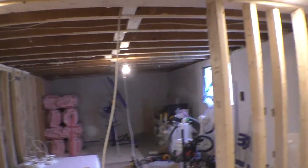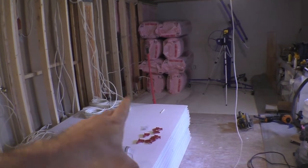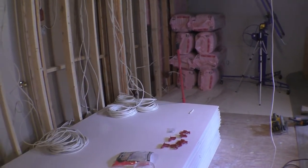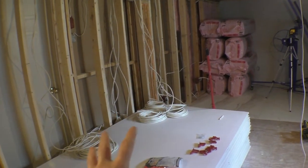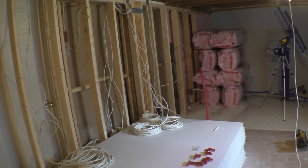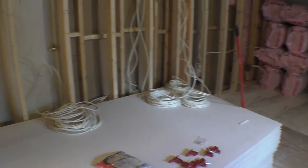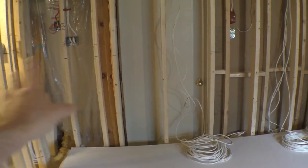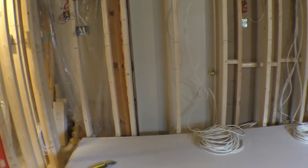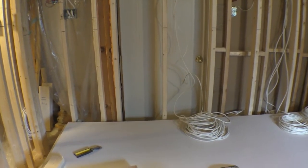The structure for the wall and double French door is mostly done. Most of the electricity and network is done, but I found some kinks — I must have pinched a cable somewhere while putting in the structure — so I need to test everything before closing the walls. The door is still the very last structure I'll do because I still need access to the workshop.